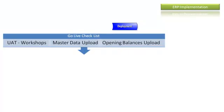In the Deployment phase, user acceptance test workshops are conducted. Each process owner tests each transaction, each business scenario, and the exceptions that were covered in the Analysis and Design phases. In most cases we will not cover all cases, and after go-live we have to expect some business exceptions that need to be revisited and redesigned, or that require some modifications in business processes.